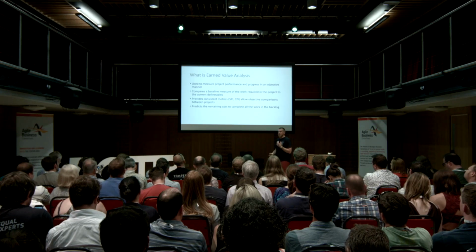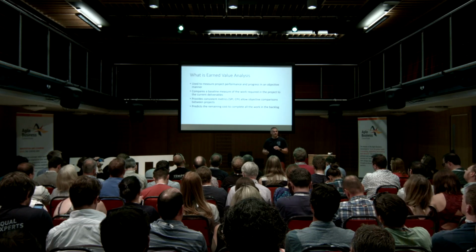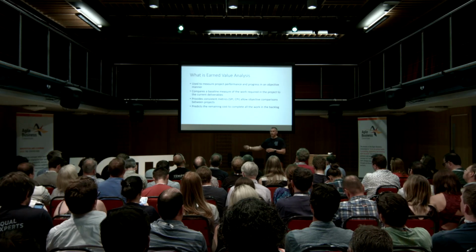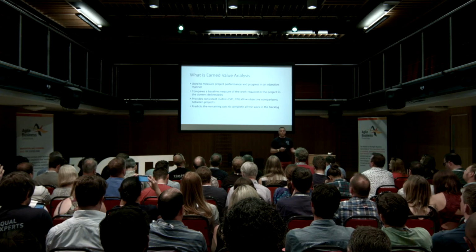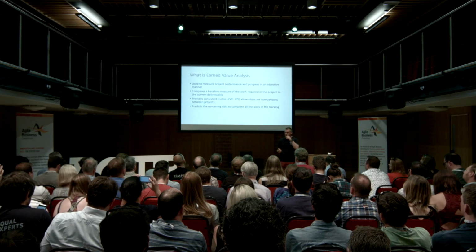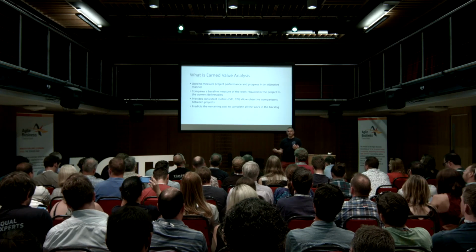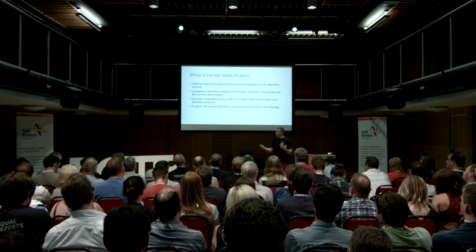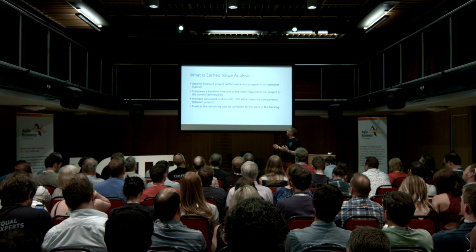Earned value analysis is something that's much more common in waterfall projects or construction projects. It's a way of comparing performance against some baseline measure in an objective way, and aims to give you some key metrics: schedule performance index and cost performance index.